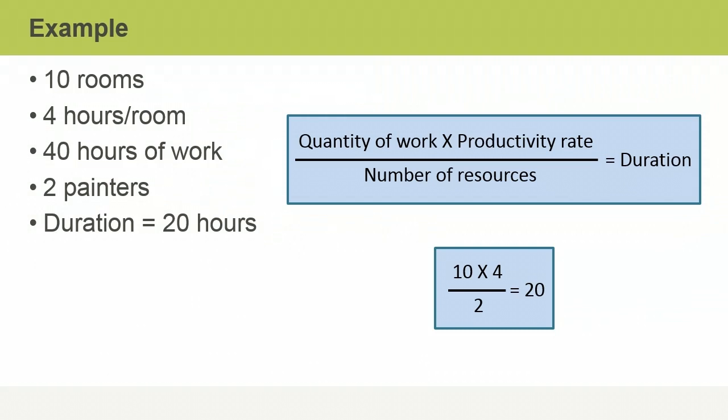Here is a simple example of how parametric estimating works. Suppose you have 10 rooms to paint. Your productivity rate, based on previous painting projects, is 4 hours to paint each room. You multiply the 2 amounts, which results in 40 hours of work. You intend to use 2 painters, so you divide the result by 2. So the duration equals 20 hours.